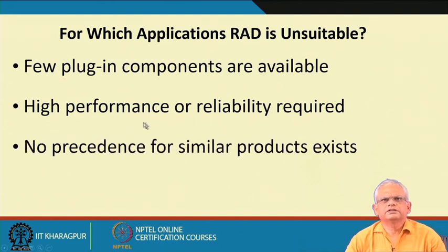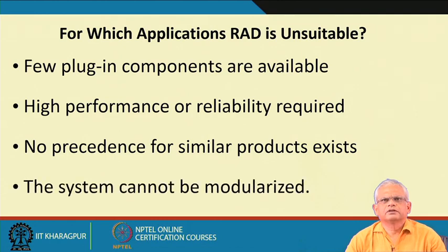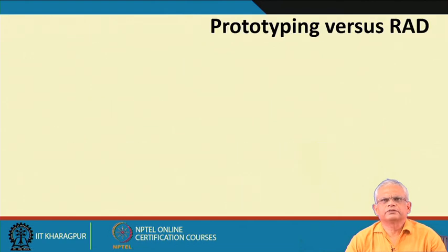If there are no precedents for similar products, then also the RAD model is unsuitable, that is, a challenging new type of software for which obviously no components would be available to use as plug-ins. For systems that cannot be modularized, RAD is unsuitable.